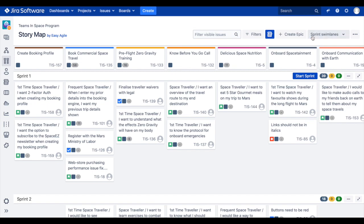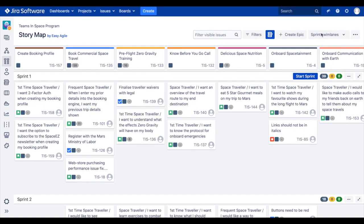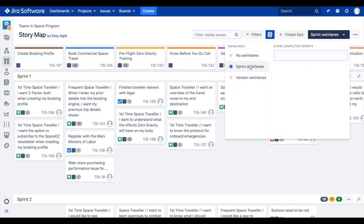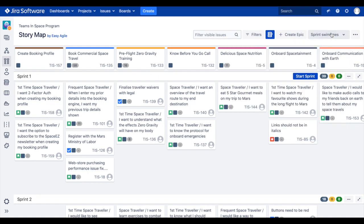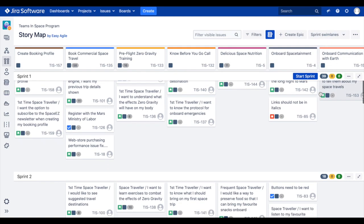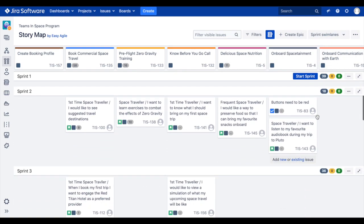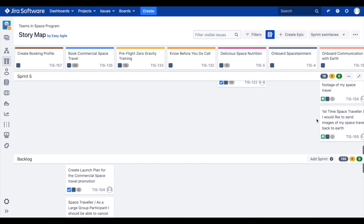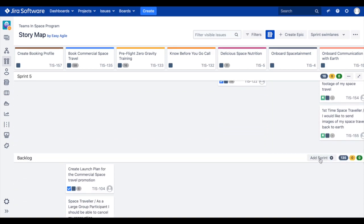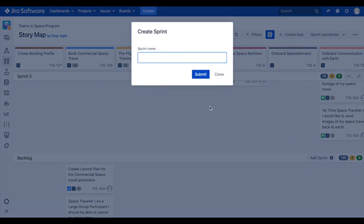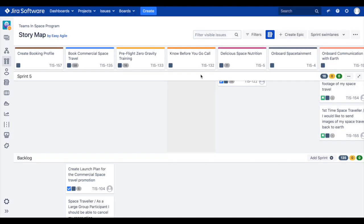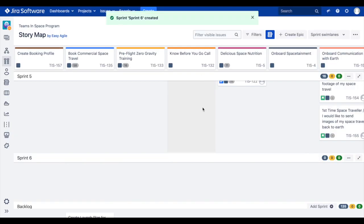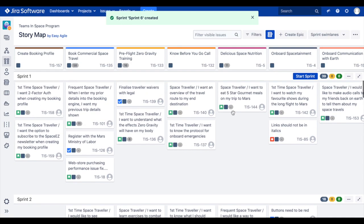In both cases, teams are able to create new sprints and versions directly from the story map. To create a new sprint on the story map, first we must make sure that the sprint swim lanes have been toggled on using the swim lanes drop-down. Scroll to the backlog swim lane at the bottom of your story map and click Add Sprint. Name your sprint and click Submit. Your new sprint will appear above the backlog on the user story map and on your board's backlog in JIRA.